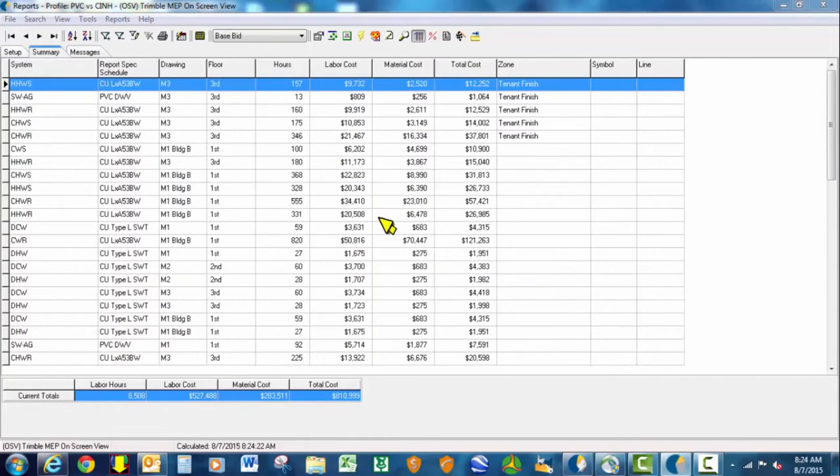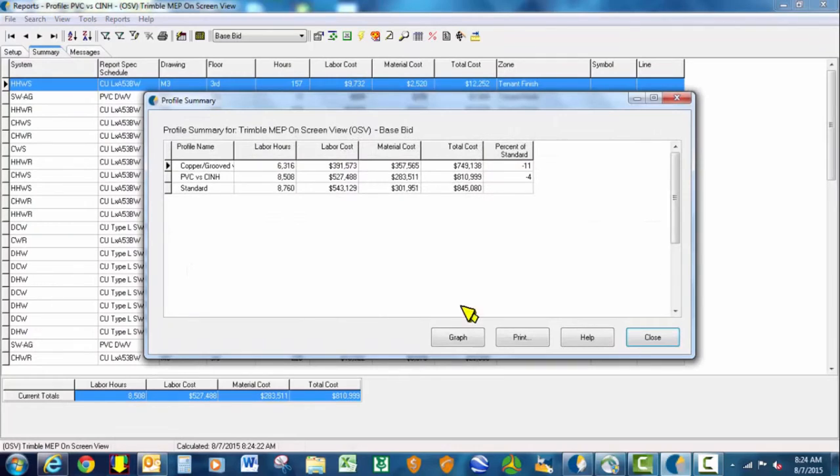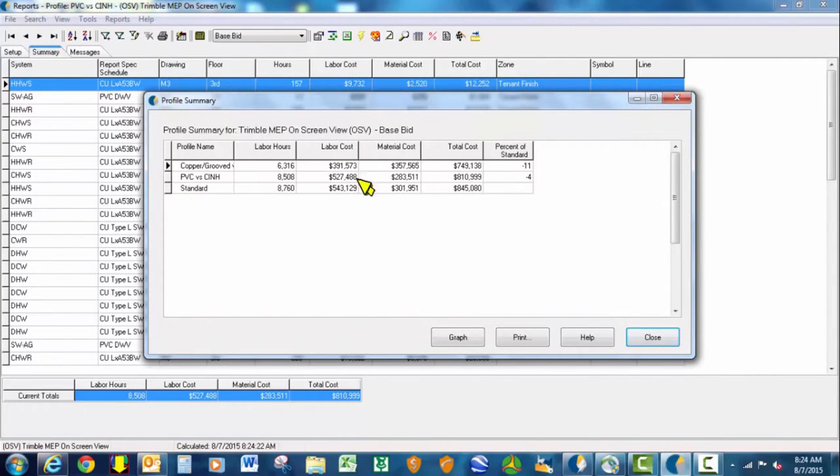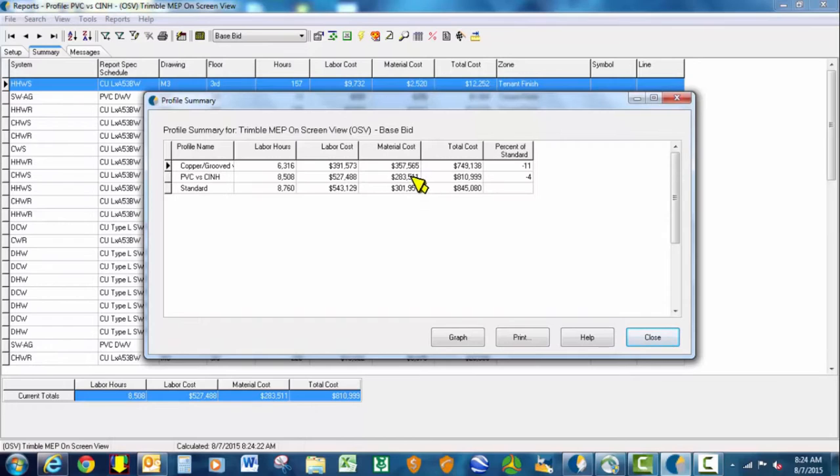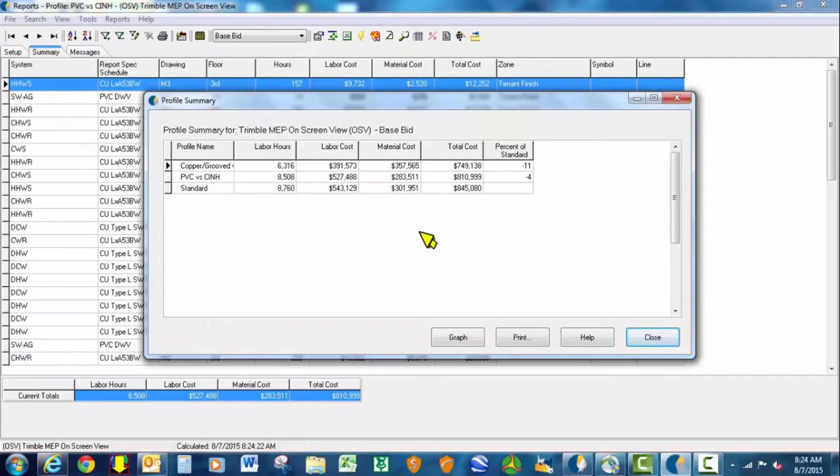So what's the scenario here? If we were able to take PVC versus cast iron, we have a minus 4%. We've saved about 250 hours in labor, and in the PVC versus cast iron no-hub, we're down about $17,000 to $18,000 in the material costs. So a very valuable option to provide to the owner.